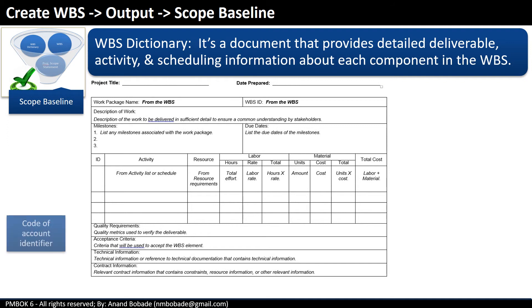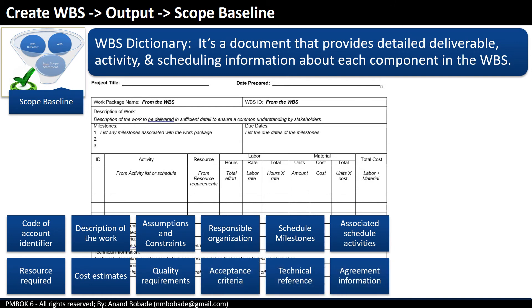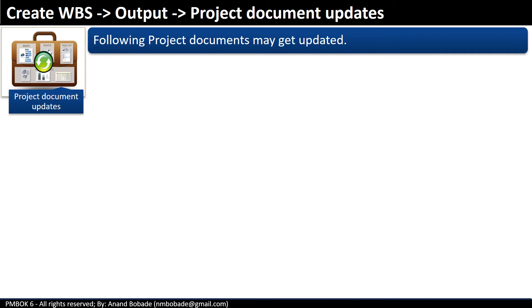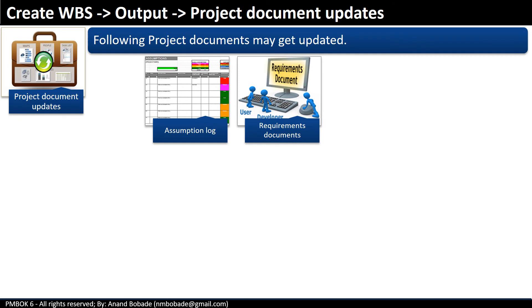One common mistake made during exams is thinking the output of Create WBS is just the WBS — remember that WBS is inside the scope baseline, so the key output is the scope baseline. WBS dictionary is a document that provides detailed deliverables, activity and schedule information about each component inside the WBS. It contains information such as: code of account identifier, description of work, assumptions and constraints, responsible organization, schedule milestones, associated schedule activities, resources required, cost estimate, quality requirements, acceptance criteria, technical references, and agreement information if that component is outsourced. All this additional information helps us understand WBS better, and all of it together — WBS, project scope statement, and WBS dictionary — forms the scope baseline. Another output is project document updates: the assumption log and requirements documentation may get updated as items are created, updated or elaborated as a result of the Create WBS process.